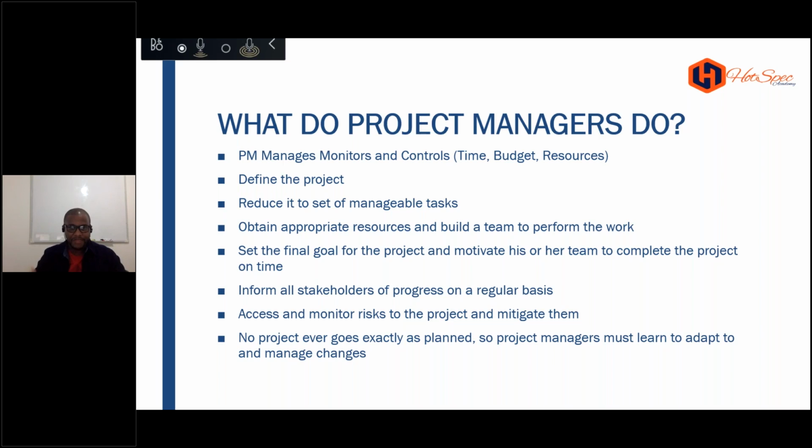We agree. Then a pre-ID can be defined. That's what we call the project initiation document. Now you might have an initial definition in the form of a business case, project charter, a contract, a project mandate, or project brief. Those are all documents which constitute the beginning of your project. In those documents, you add what the objectives of the project are all about.